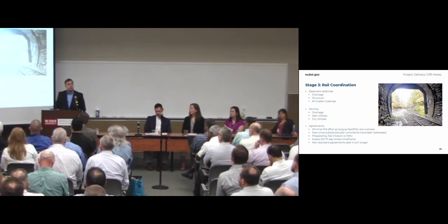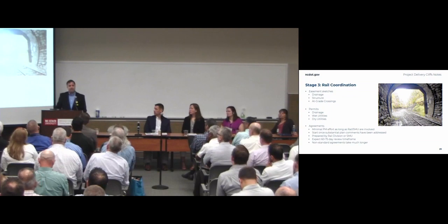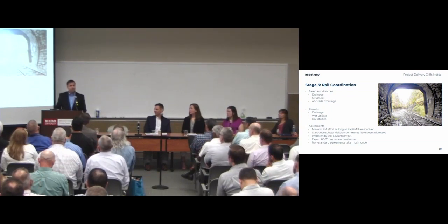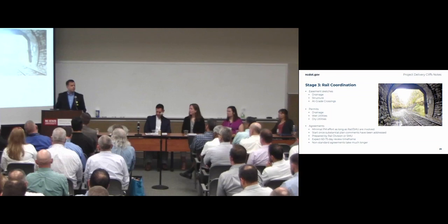Initial reviews, I say it's taken between 60 and 75 days now. I will say there are projects that have been painful, and I do mean painful. It's taken almost a year on some, 6 to 8 months on others. Matt's project is one of those projects that have been sacrificed as part of that process. But that does help everything else going forward.